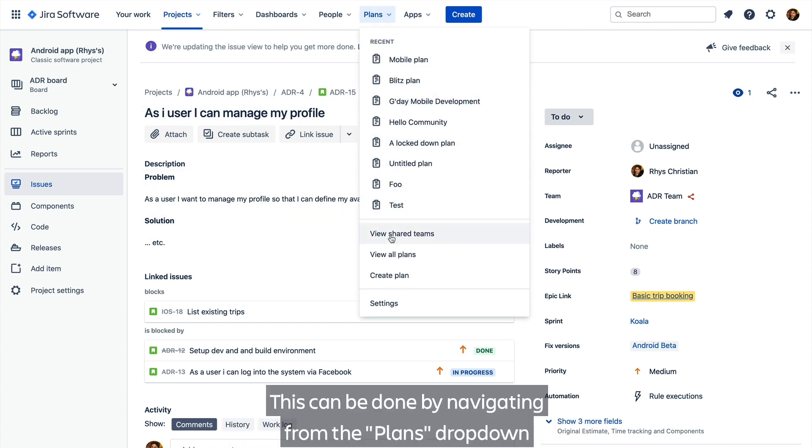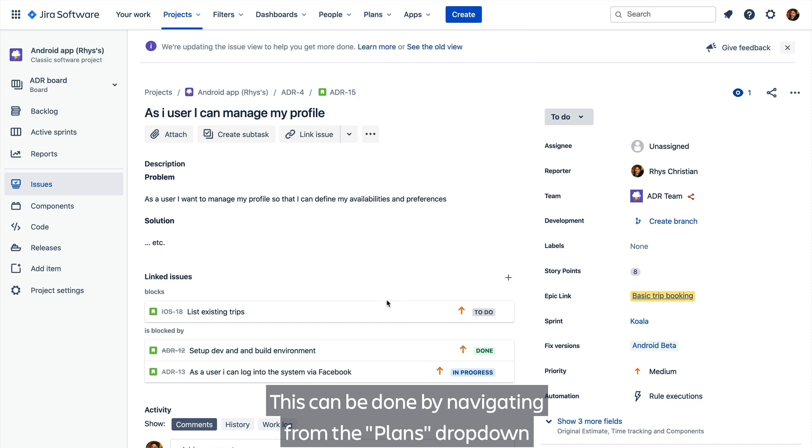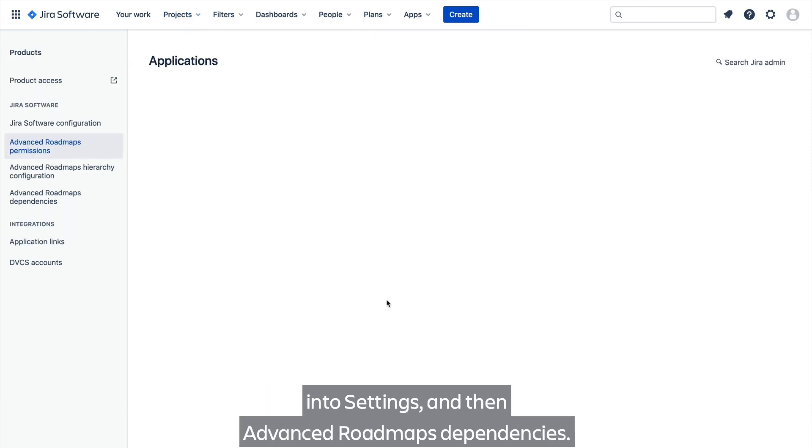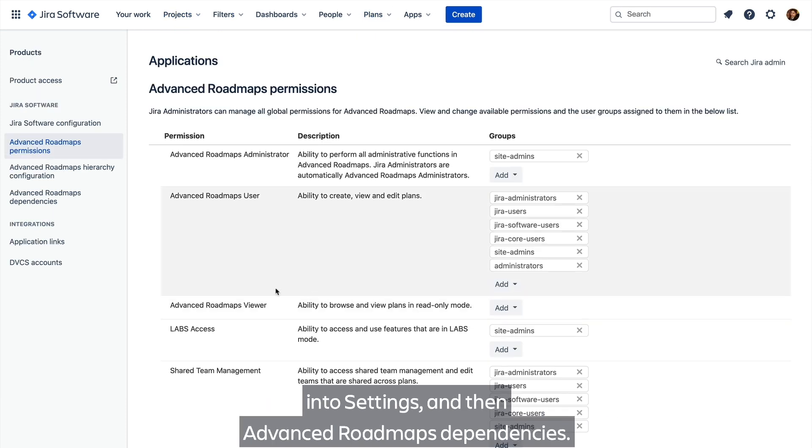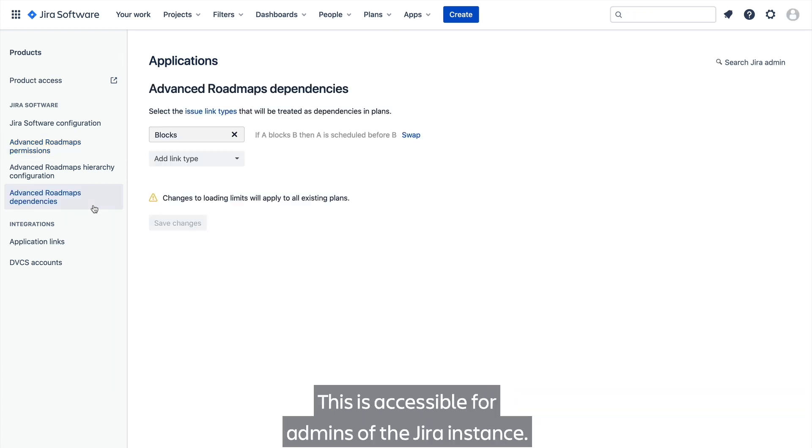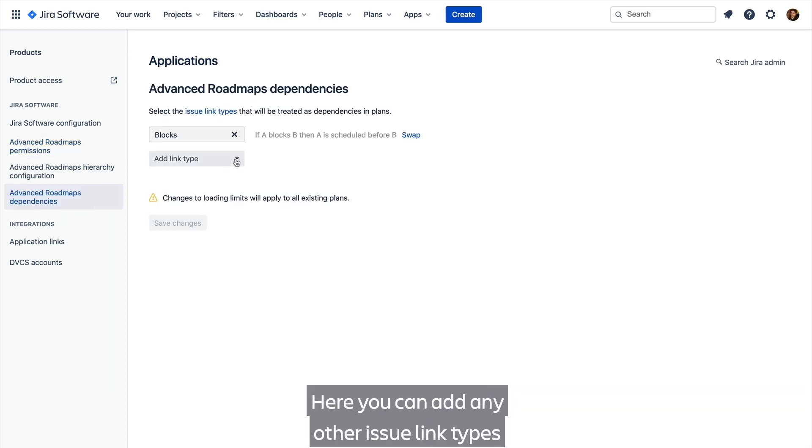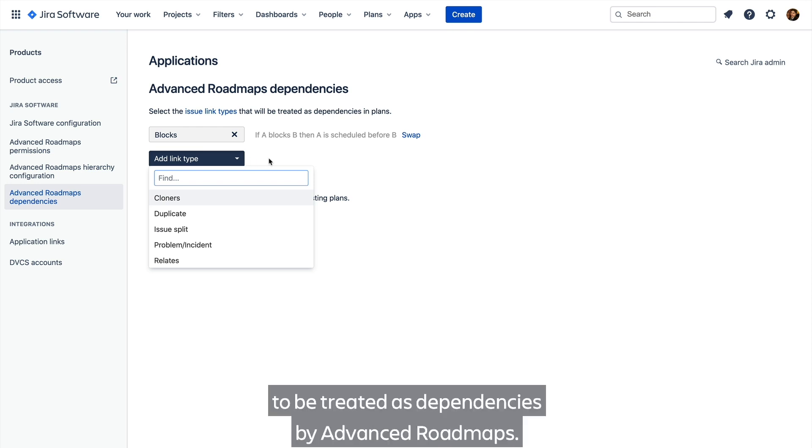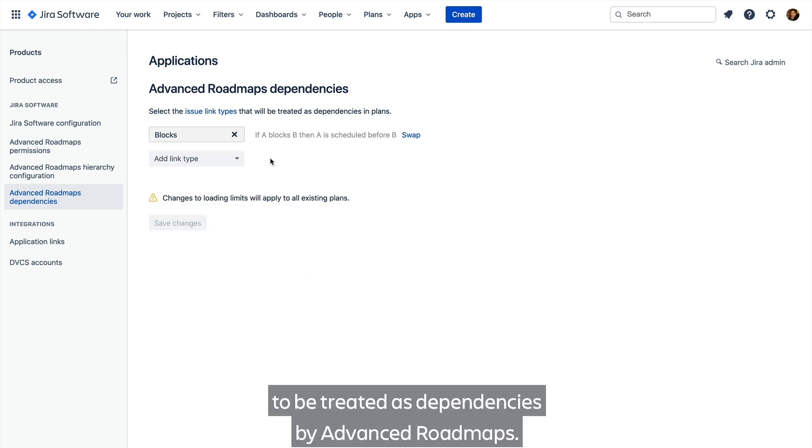This can be done by navigating from the plan dropdown into Settings, and then Advanced Roadmaps Dependencies. This is accessible for admins of the Jira instance. Here you can add any other issue link types stored in the instance to be treated as dependencies by Advanced Roadmaps.